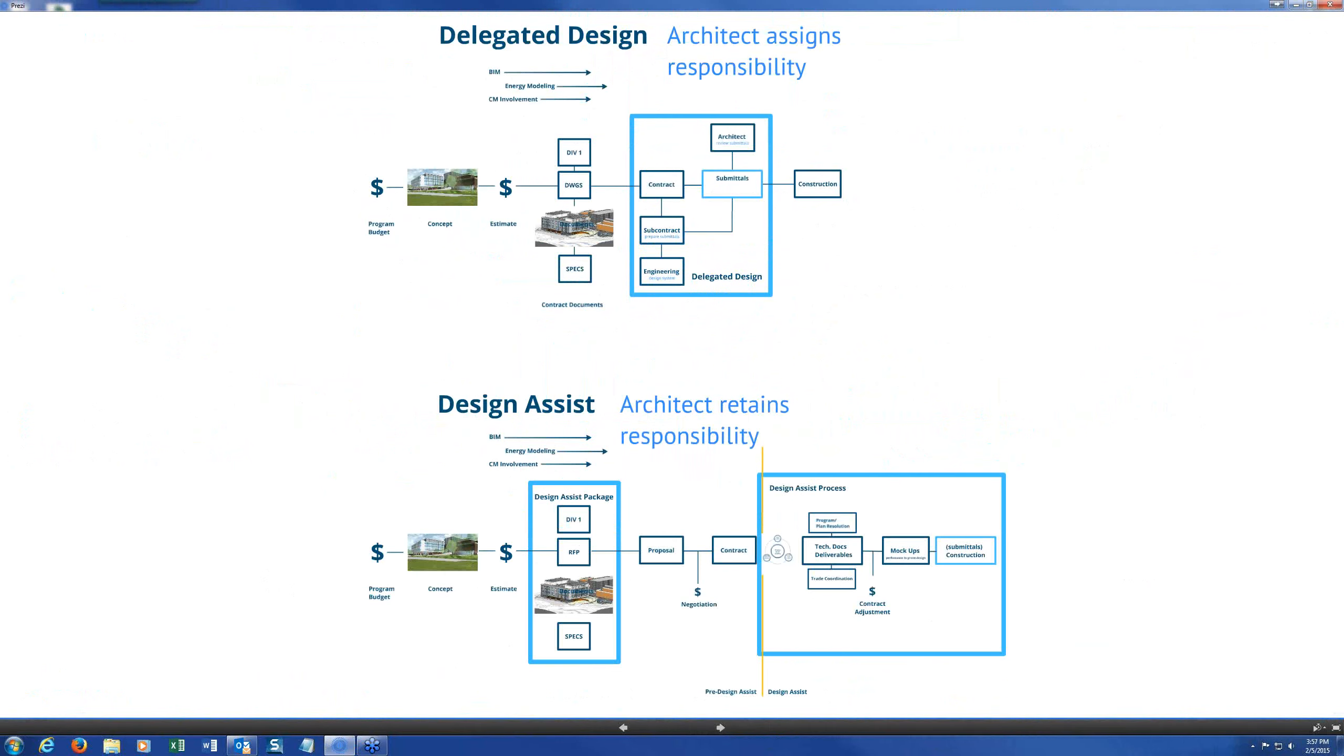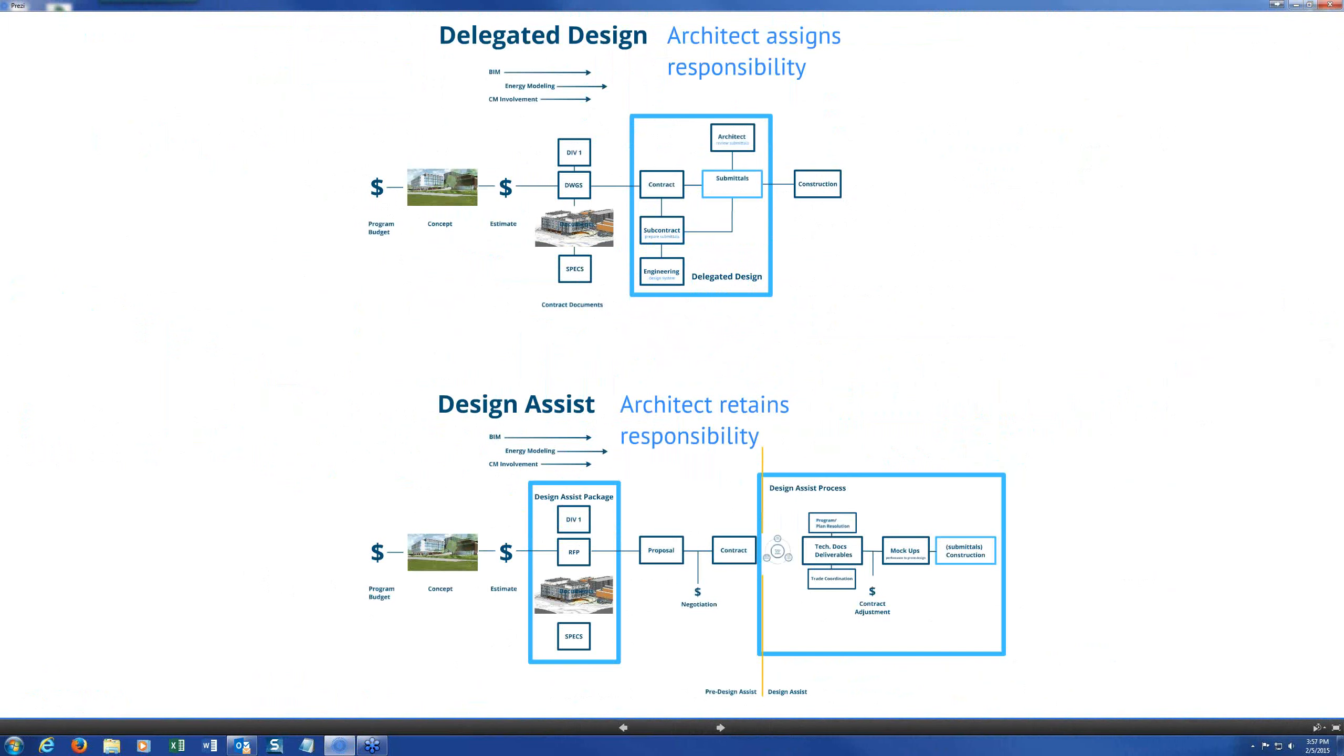And I just want to reiterate that I see design assist as it's a collaborative process with the ultimate goal for design assist is to get to an approved shop drawing that can actually be used for construction. So we talked a little bit about this earlier when I was showing you the circular pattern that was going on with design assist. You're going to have the architect suggest something, the subcontractor implement it, both of them sit down, review and refine it, and they're going to repeat that process as often as it takes until they get to the final where it's an approvable shop drawing that they can move into construction. And there we are, we've made it through. Are there any remaining questions there Lewis? There are a couple of comments. Jim Spinola says, for non-proprietary projects where I specify a basis of design, I require delegated design if the contractor wishes to provide an approved equal. If it is structural or envelope related I will require E&O as required by the owner's legal and insurance advisors.